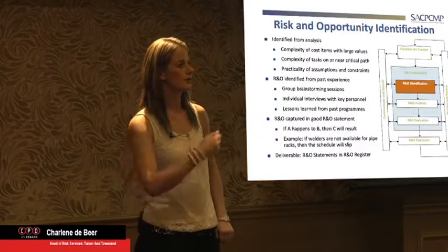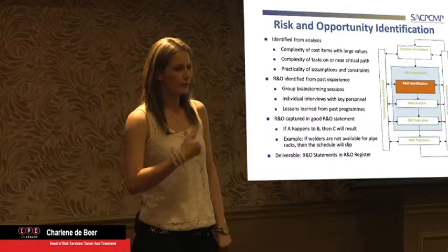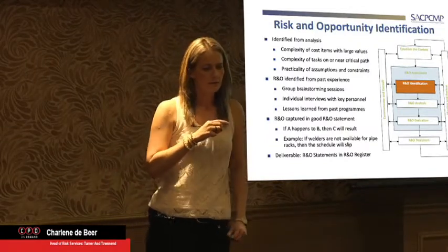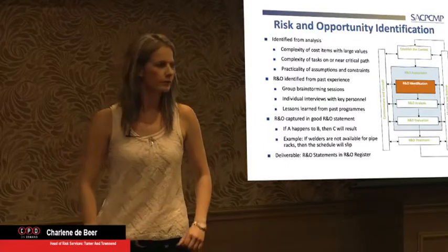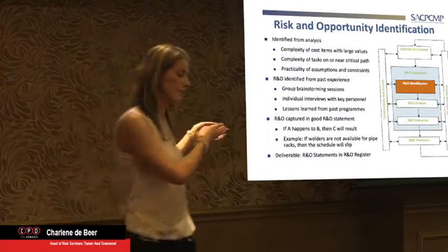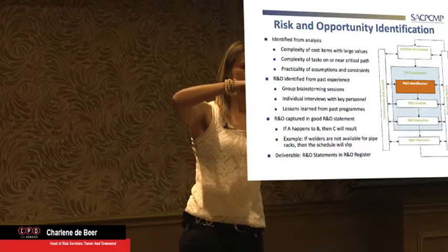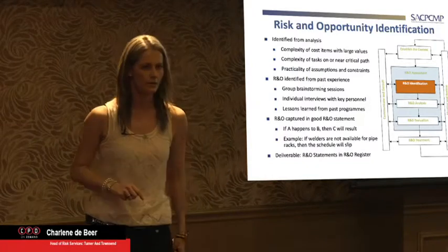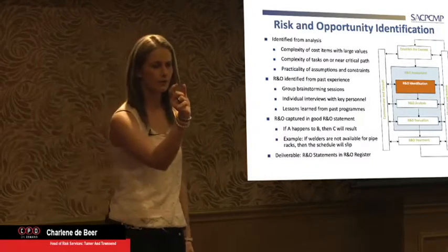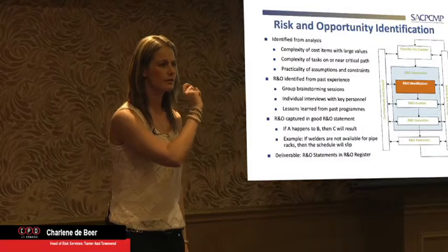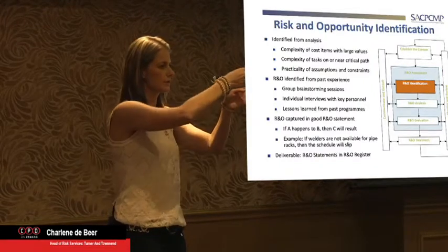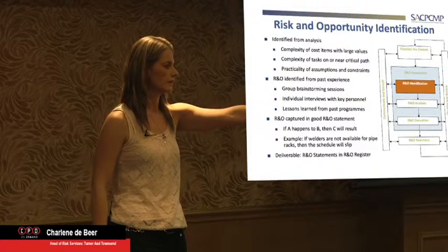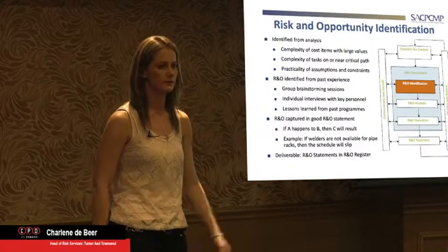And then of course, if we overrun on schedule, there'll still be an overhead cost we will have to cover. If schedule overruns by a month, yes, we will have a demobilization plan, not only of the labor force on site, but from a management point of view. But you'll always keep a certain number of people on site until the job is totally commissioned and handed over, right? So there'll still be a proportionate cost there as well. So when we cost a risk, we need to cost it in all those buckets. Because if I just cost engineering, my cost is going to be too little.